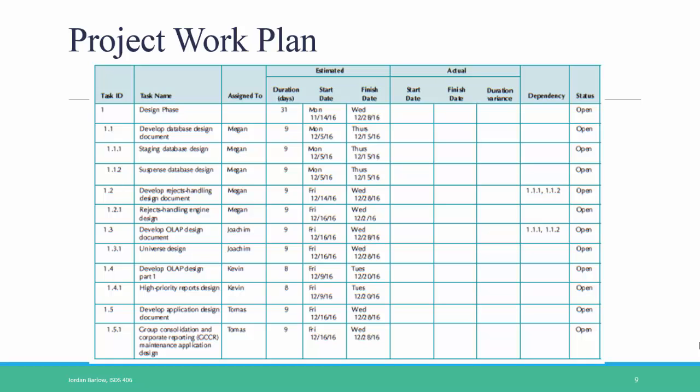This is a nice example of how to format a project work plan, but don't follow it too closely when completing the homework. First, this project work plan only shows the design phase — you'll also want to include planning, analysis, and implementation steps. Second, because you haven't arrived at the design phase yet, you don't know as many specific design details as are shown here — for example, you don't know what type of database you'll be using. Finally, most project work plans have many more dependencies than are shown here.